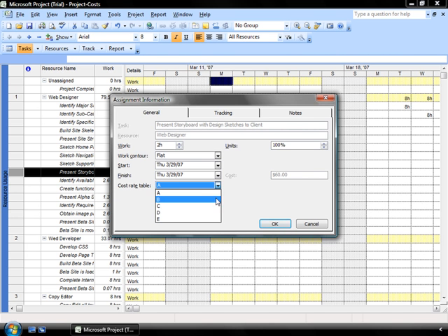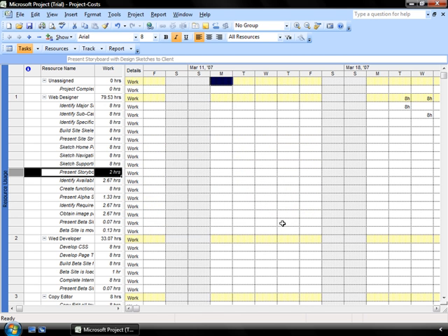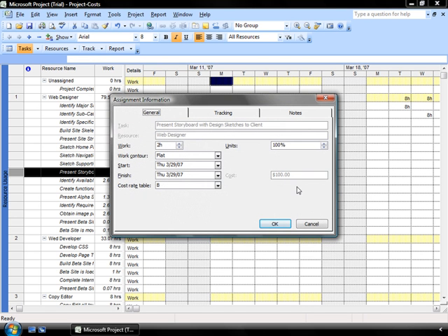In this case, I want to use the rates under tab B for this individual, which is going to increase the rate that I'm going to pay them to do that job. We'll take a look at the original amount was going to be $60 to do that particular presentation under his old rates. If I click OK to now assign rate plan number B, go back in there, I now see that my cost has been updated to reflect the $50 an hour rate that I'm prepared to pay that particular individual. So you can see that there are nice ways that you can update and increase and nuance the costs per task, per resource.